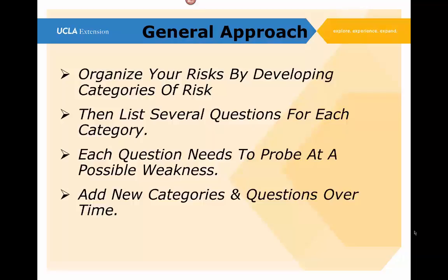You can organize them by developing categories of risk: cost risk, schedule risk, performance risks, or you can do it any other way. You can do it by technical element or by subject matter expert. Any way that makes it easy on you to understand the various risks, to see if there is any commonality between the risks, or how you can understand them better.